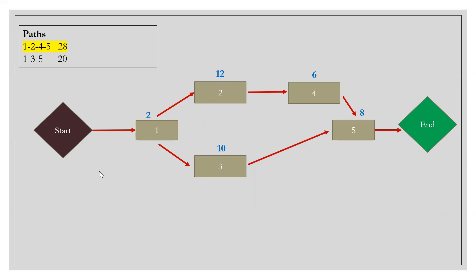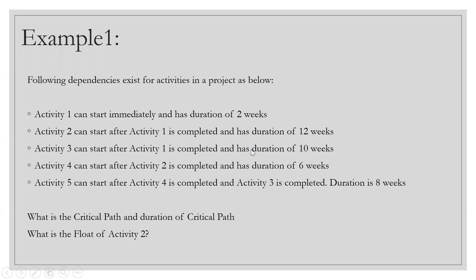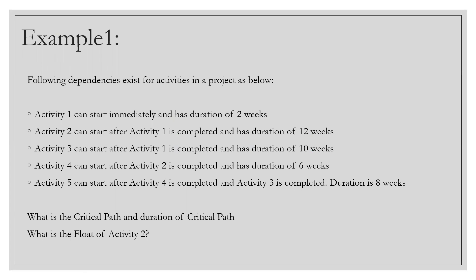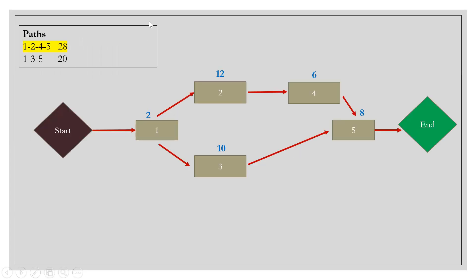All activities on the critical path will have a float of zero, which also makes your job easier if you need to find early start, early finish, late start, and late finish using the forward and backward pass — because you already know the float is zero. The answers to the example questions are: critical path is 1→2→4→5, duration is 28 weeks, and the float of Activity 2 is zero because it lies on the critical path.